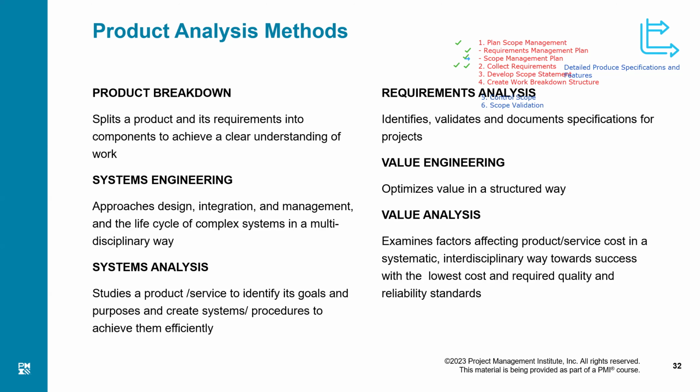But what do we do with nuts and bolts? That product breakdown structure doesn't tell us what to do with these nuts. For that, we need to convert it into work. For example, there is a nut, then we'll say screw it on, right?